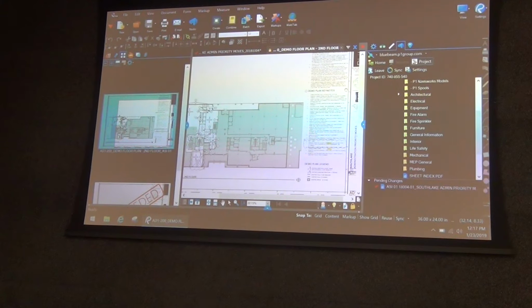You have both mentioned the automation a little bit, and Vanessa, you did a lot of programming with the developer to integrate SharePoint. Can you give a quick overview of what happens when you start a project? Yeah, we kick off a workflow in SharePoint that automatically takes the project name and number and creates the project using Bluebeam's API calls.